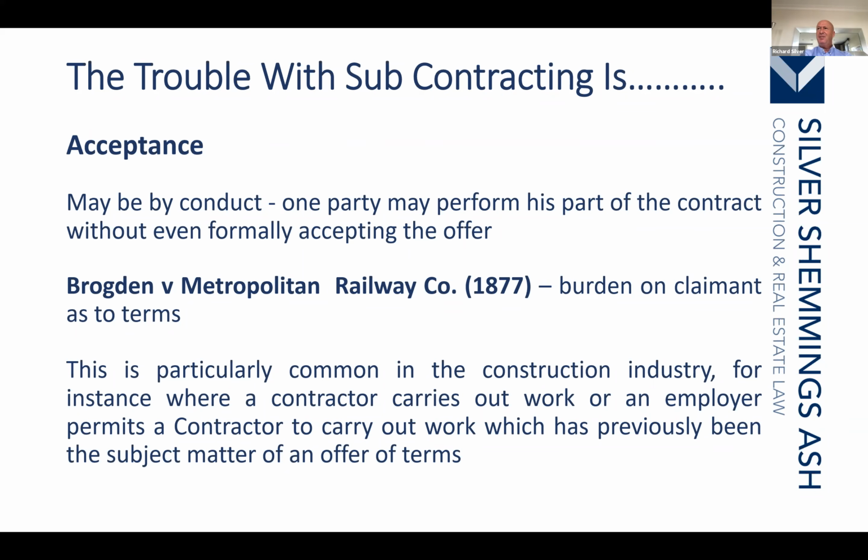Okay, if that's right, what we need to do is to establish what has been accepted. And although it sounds obvious, an acceptance must follow the offer. You can't accept something that you have not received. So if you're going to state that a party by starting works on site has accepted an offer, you must establish that the offer was issued before they started on site. In other words, if the main contractor issues the order after the works have actually been started on site, you can't have accepted something you had not received. It's impossible.